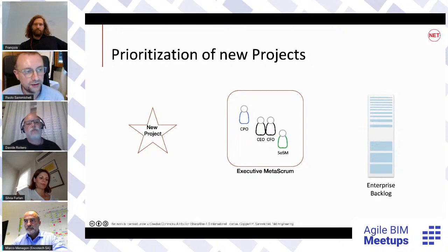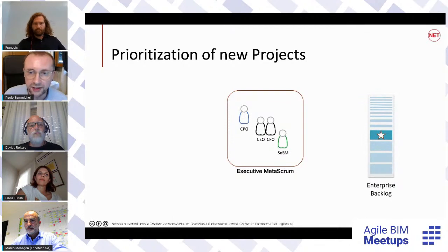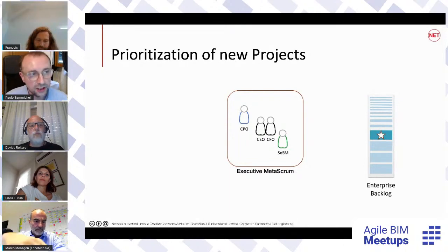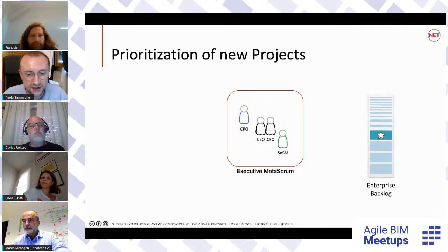During the sprint, we use a pattern that David already introduced called the swarming pattern. You can see the link if you want to understand more. I borrowed the slogan from Kanban, stop starting, start finishing, to make the first pilot team, again, this is a pre-COVID picture, the first Scrum team, understand that it was better to have a finished project and two not started projects rather than just having started projects and nothing finished.